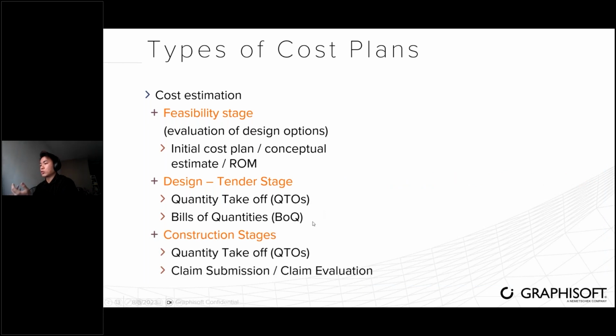So also, the same for construction stage QTOs. The QTO will not be taken off, because you need it for claim submission and also for claim evaluation if there are any differences from the site or any value engineering being conducted.